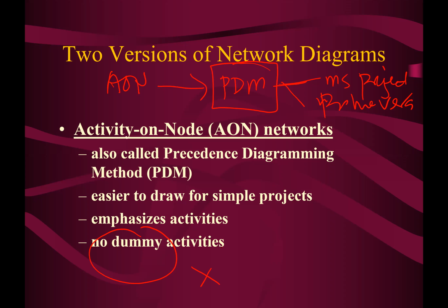We don't need dummy activities in a PDM diagram because it is not necessary. The relationships inside the PDM diagram are sufficient enough. It can accommodate different types of relationships. It can reflect whatever we wish the reader of our diagram to understand.